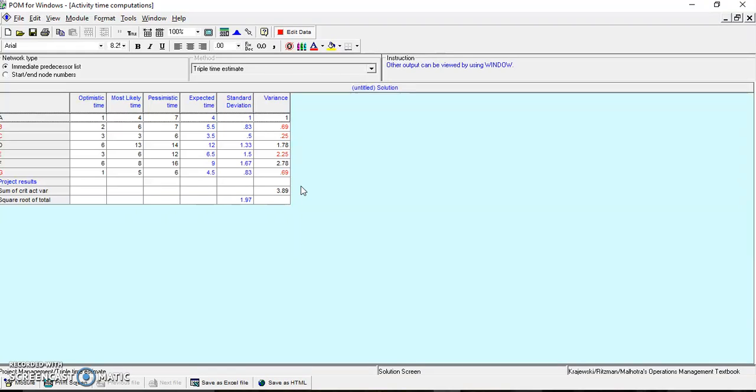So I just wanted you to know that little trick. If the number that you're asking for is larger than the estimated time, you go to that chart, you take that number directly off the chart. But if it's the smaller time you're asking for, then it's 1 minus that number from the chart. All right, I hope I've explained that well enough. And if you have any questions, you can let me know, okay?